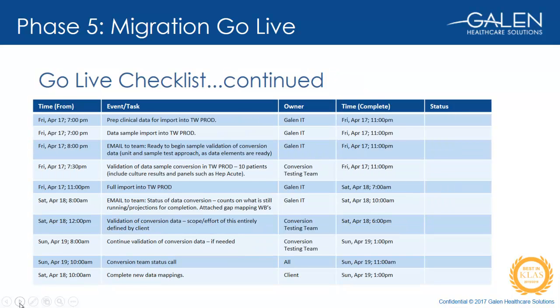Even though multiple rounds of testing have been done in the test environment, the recently refreshed from production environment and later rounds, the recommendation is still to include a small set of validation in production with the go-live data before loading the full scale load. How many patients the client wants to validate is negotiable, whatever needs to be done for achieving a comfort level.